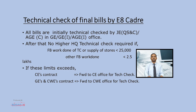Technical check of final bills by E8 CADR: all bills shall be initially checked by GE QS&C and AG contract in GE and AG independent office. If work done on a final bill for a term contract or supply of stores is less than 25,000, or for other final bills work done is less than 2.5 lakhs, then technical check by CWE office is not required. Otherwise, all final bills will be forwarded to CWE office for further technical check, except in Chief Engineer's contracts where the final bill is forwarded directly to the Chief Engineer's office.